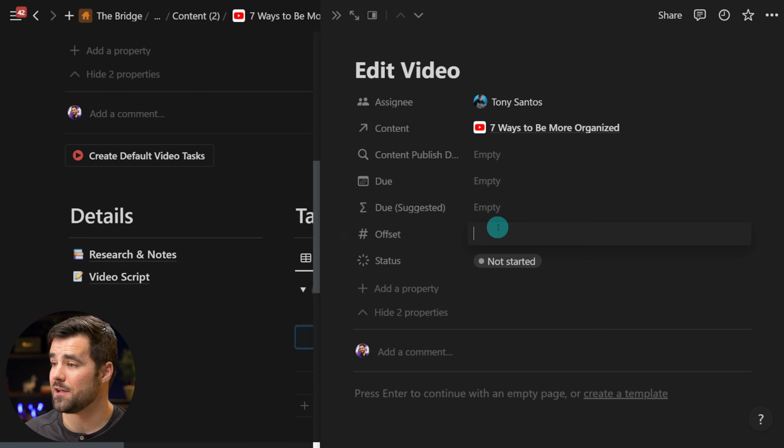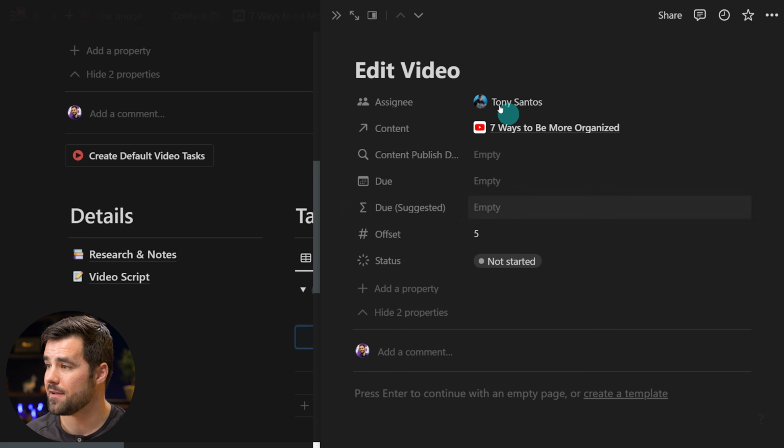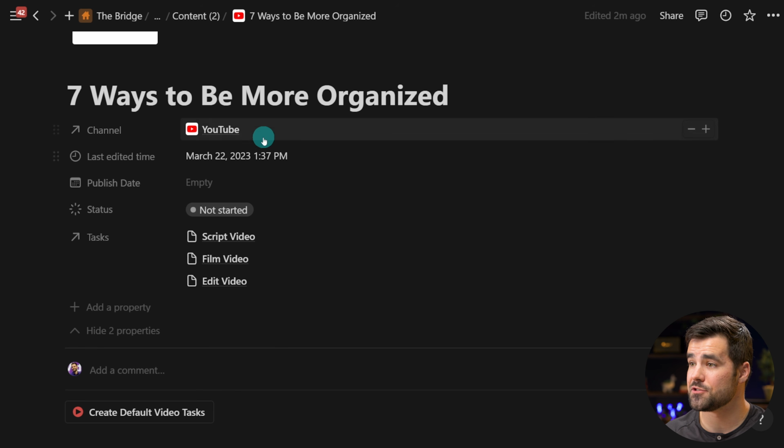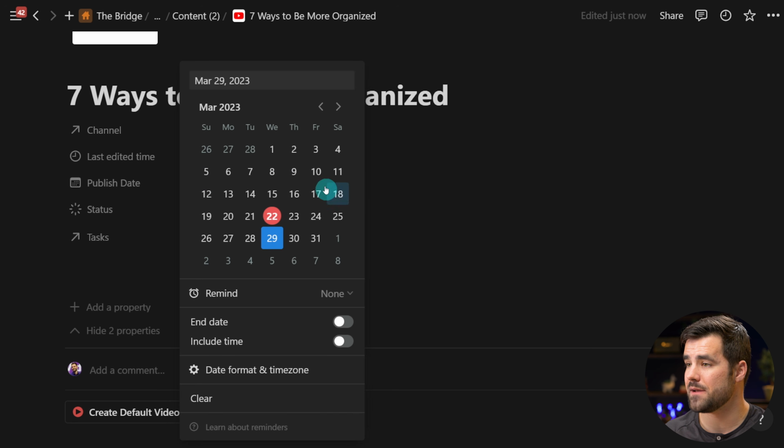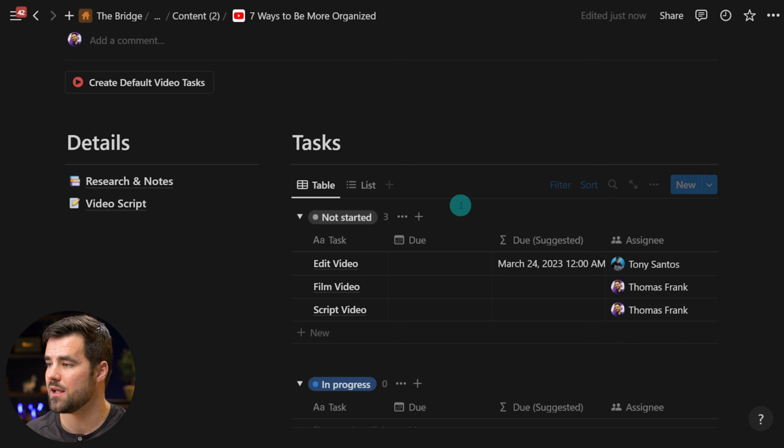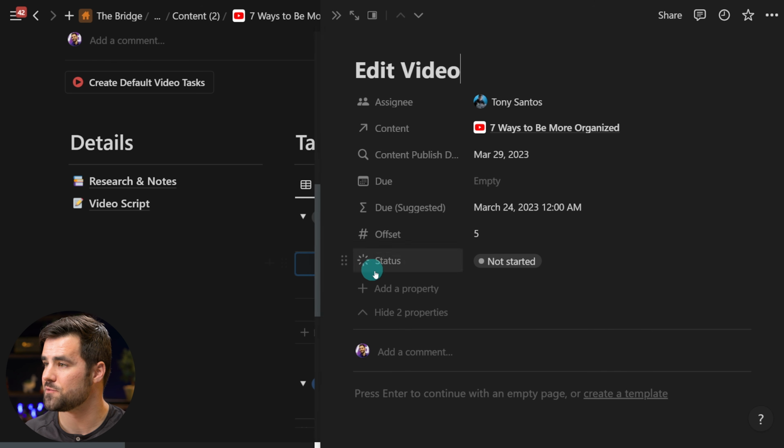So for example, if I set the offset here as 5, and I went back and actually set a published date for this video, let's just say a week from now, March 29th, 2023, now we have a due date that is suggested for us, March 24th, 2023. If we open this back up, we can see that our offset is now modifying the content published date and giving us a new date as a suggestion.